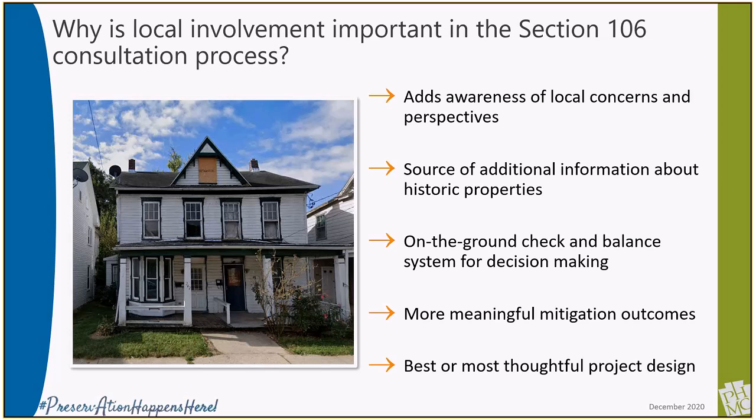Public involvement in the consultation process gives the federal agency or local administrator the opportunity to describe the intentions and benefits of the proposed project and to explain the alternatives explored. Discussing the backstory behind the currently proposed project with consulting parties allows for better understanding of all factors in the decision-making process. If an adverse effect cannot be avoided and an agreement is needed, local perspectives can lead to more meaningful mitigation measures that best serve the interests of the community. One form of adverse effect mitigation is input into the design of new construction.